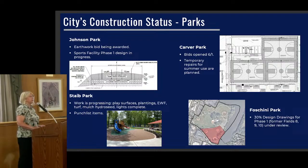Stide Park, the contractor is still facing penalties at this point in time. He's very close to obtaining his CO. We are just about down to punch list items. There's one small matter with the bathrooms that needs to be checked or remedied to comply with the contract documents, and we anticipate that it will be fully operable soon. But as I indicate, the furniture itself will have to wait until July. We have documentation from his supplier that's when the supplier can provide the materials.